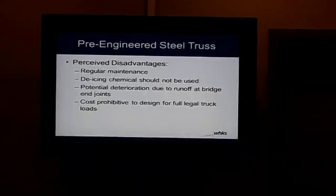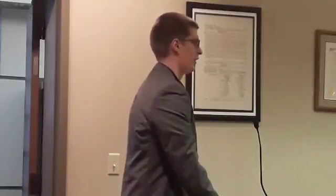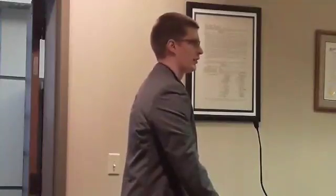The painted bridge costs are very high to go out and do maintenance on a painted bridge. When we were talking about the repair option, $400,000 of the $2.35 million of that price tag was in painting, and that was with the bridge on the ground. And so the bridge staying over water, fully contained, blasted, and painted could run in the hundreds of thousands of dollars. Now that wouldn't take place but every 20 years or so, but that's a huge cost that needs to be considered, and so we just want to disclose that.